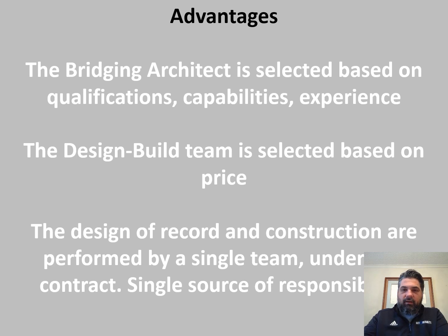And so, the bridging architect is typically then just selected based on their qualifications. And then the design build team is selected based on price. So you get kind of the best of both worlds and kind of mitigates the owner's risk. But again, the design of record and the construction are performed by a single team, and that way there's a single source of responsibility.